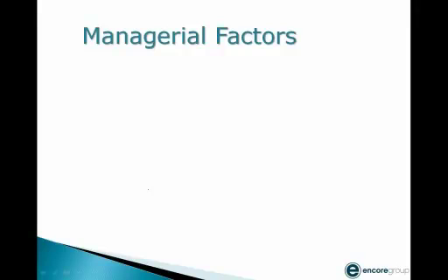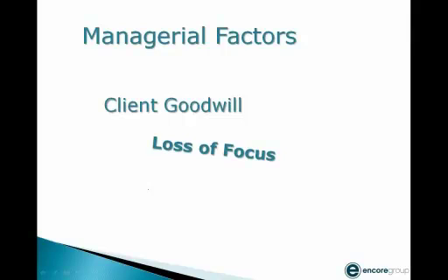So another big factor in your risk assessment, or analyzing the risk of this claim and resolving it, is managerial factors. How much is this going to impact the relationship with this other party, whether it's my client or a contractor or an owner? Is this going to create a situation where I have a loss of goodwill, where maybe I can't get any more work from this owner, or maybe the owner is going to have such a negative impact towards my work that on the next job I get, they're not going to be as generous in change orders or whatever. So you have to look at goodwill.